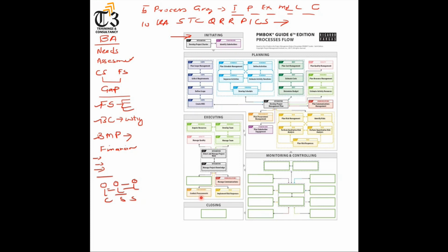While implementing, what you have to do is conduct procurement. For conducting the procurement, we have the agreements. We have fixed price contracts where the scope of work is available. We can use them for longer durations of project. Buyer is safe and seller at risk. They all have 3 types. Firm fixed price, like all together, a lump sum type of thing. Incentive is to motivate the suppliers to achieve some objectives. And economic price adjustment, where any changes because of government will be reimbursed or added in the contract.